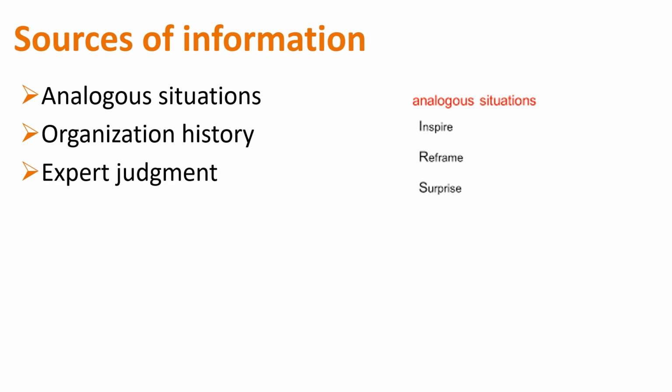But once you're in those sprints, you're definitely using a combination of analogous because you've been in those sprints, you're working on the same software, you've made these changes or very similar changes, and it's the same people. But when you start changing the people, let's say that every 3 years you do a requirements tool evaluation, right? So you've done it before. That's organizational history. Other people have done it before, so you could look at theirs. So analogous is similar situation. Organization history is specific to the people there with similar work. Okay.